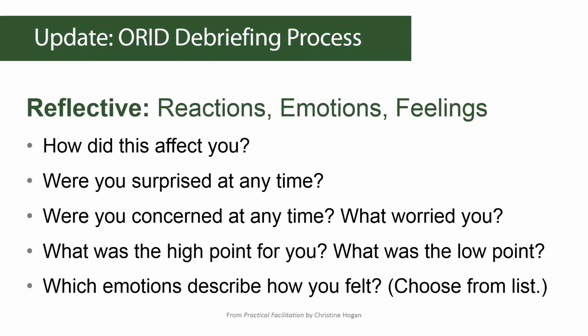So it's important to separate, okay, what was the situation? Well, we had the release, it was supposed to be done at 3:00, but then we weren't quite done until 3:30. By the time we were done, problems immediately started coming in, and we spent 2 hours diagnosing that before we could figure out what we were going to do about it. So you're breaking down what happened. But then in terms of emotions, you ask, how were you feeling when you first noticed this? How were you feeling when somebody inserted themselves into the process and started giving orders, or when you couldn't reach somebody who was critical to solving the problem? Those are the examples of where we would want to talk about those emotions before we get into the analytical mode of things.